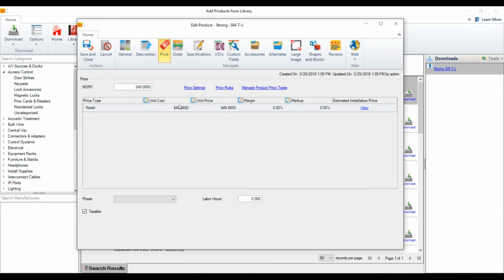They provide costs. So again, since this was a fresh one, you would want to pick a phase, or pick a number of hours as well, an hour to install, if you're using phase labor per products, and then of course use a price setting or a price rule to set your unit price, or type in a margin, 50% margin or whatever you sell this out as.